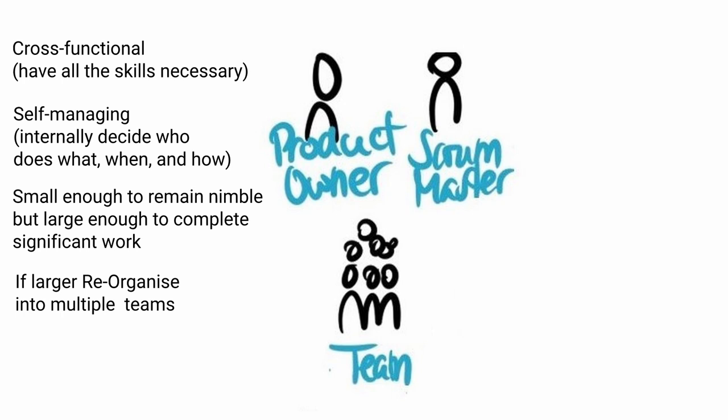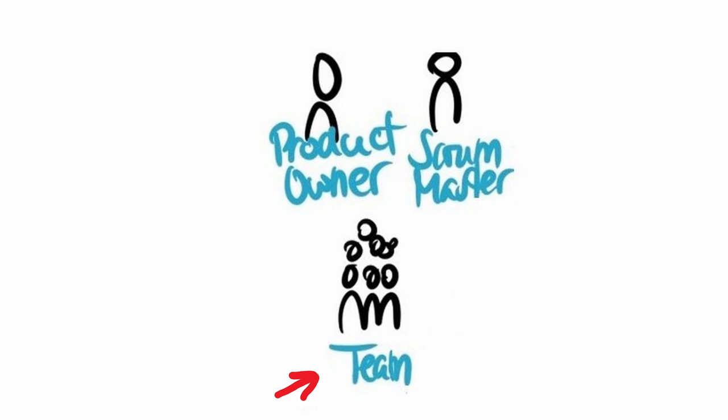Team members are the people in the team who do the actual work, whatever that work happens to be across whatever domain the team is working in. Team members are always accountable for creating a plan for the sprint — the sprint backlog — instilling quality by adhering to a definition of done, adapting the plan daily towards the sprint goal, and holding each other accountable as professionals.